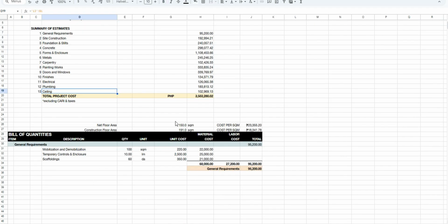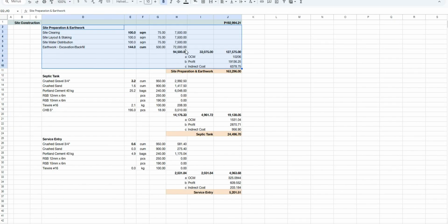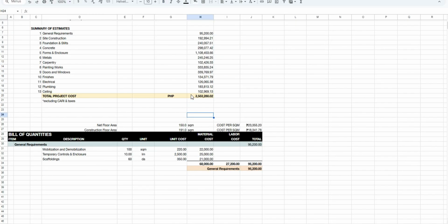The problem is, usually many people do direct costs and then materials, labor, right? The materials and labor equal the direct cost, and then they get the percentage of that direct cost for supervision, miscellaneous. So when one work is removed, the whole thing changes and it becomes hard to calculate again. Why? Because usually you put 40% of materials as your labor, right?